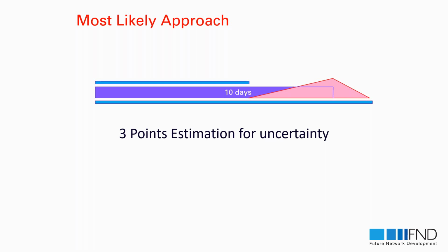But if there is no material delivery on time, if the design document is not as clear as we expected, and we stop the work and ask the designer or engineer, RFI, to provide us the detail, we will have problems with mobilization and demobilization from one location to another. If the team before us completes the job and gives us the area on time, if there is no problem accessing the building, then I can do it in 17 days.